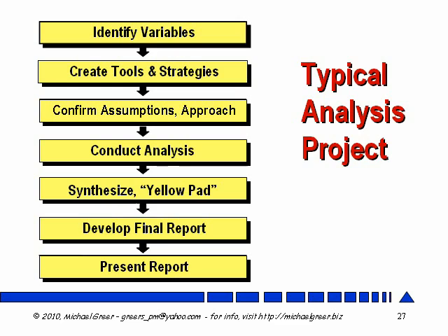the client. After doing that analysis, I can then create a synthesis of my rough findings, or a yellow pad. I just don't jump into developing the final report. I create what I call a yellow pad, or a kind of a quick and dirty review of the findings. That way they can tell me what to emphasize, what to do a little more homework on, and to get some feedback on things before I spend the time creating that final report. Now I'm ready to go and present the report.